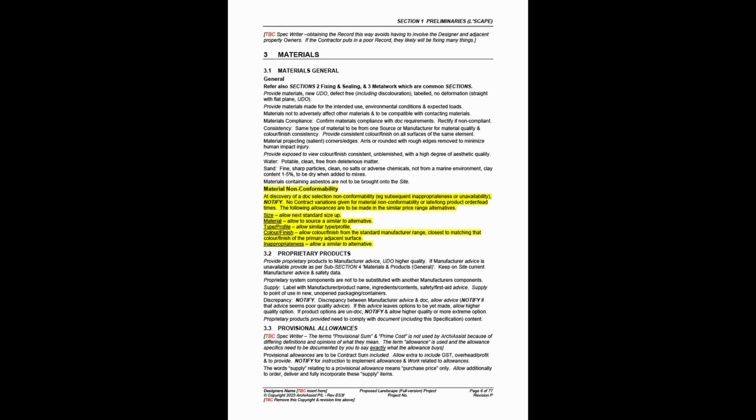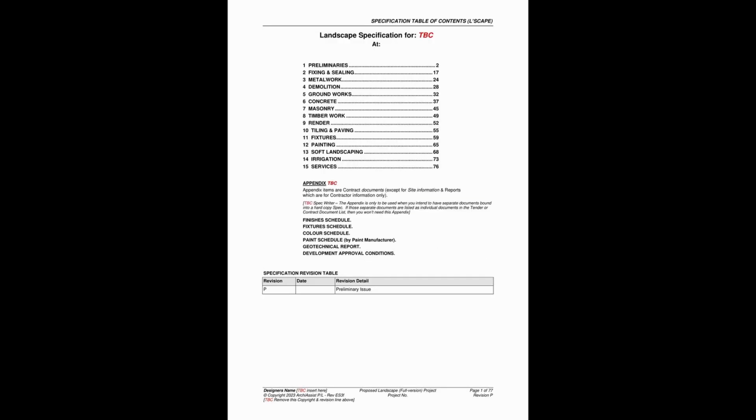With all defaults, the builder, upon discovery of the fault, is to immediately notify the superintendent, and is to allow the default specified. Specifications are complex. They call up all the building detail, which can amount to many hundreds, likely thousands, of items. So, they need to be comprehensive and predictable, but also simple, practical, and user-friendly. ArchiAssist achieves all of this.